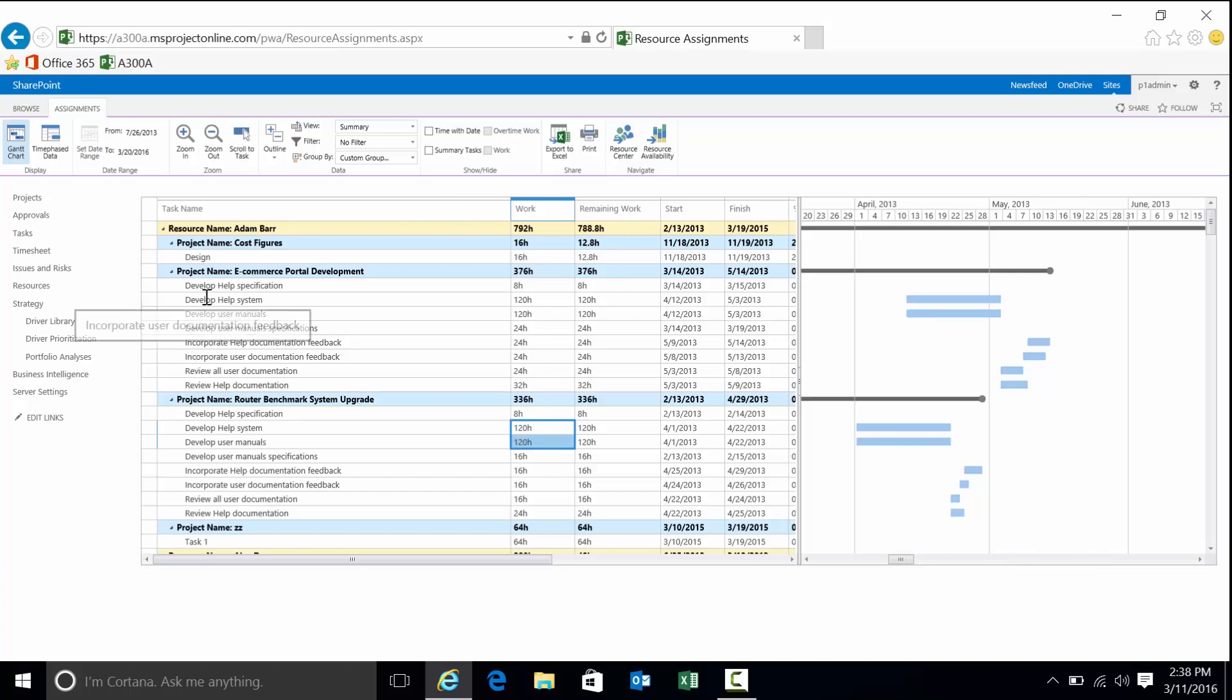We certainly have issues within the project. It may have been tasks had slipped. It may have been a situation where these predecessor-successor relationships were wrong to begin with. Obviously, there's something wrong within the projects themselves that have to be resolved. Project manager now has sufficient information from which to make those corrections. That's really some of the power of the Resource Center, to have all this information at your fingertips.